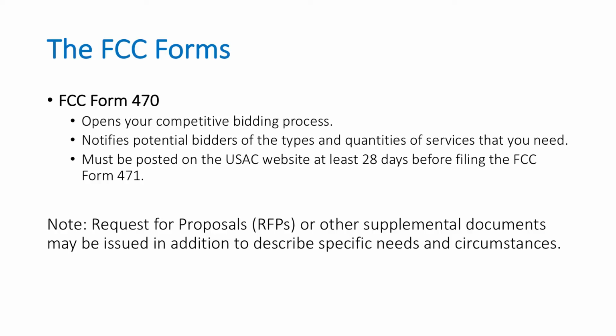Now, in my opinion only, I believe that an RFP should always accompany a 470 because I believe it offers a layer of protection for the school district or the library system. You can put in terms and conditions, things that are required for you, expectations of different things. It also provides a platform of how you're going to score those providers. You put in a scoring rubric within there so the providers know how they're going to be graded and scored.